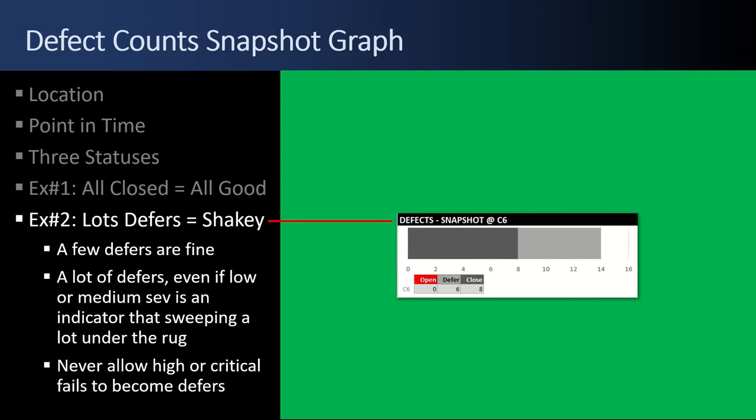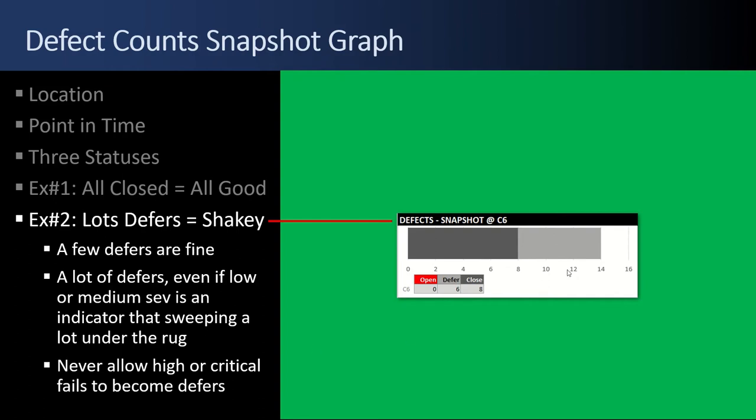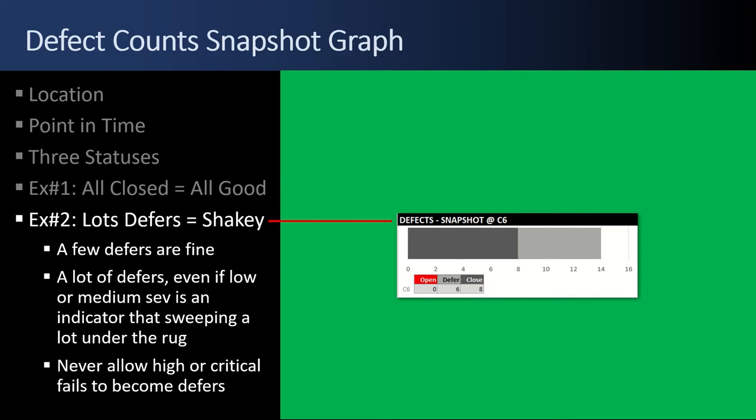Example number two, if there's lots of defers, like half of the defects are light gray, that's a bit shaky. A few defers are fine and normal. A lot of defers though, even if they're low or medium severity, that's kind of an indicator that maybe stuff's getting swept under the rug. And never allow higher critical fails to become defers. I look at this chart and go, wow, it's a lot of defers.